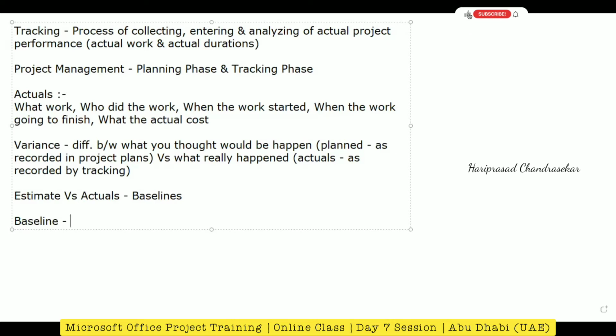A baseline is a snapshot of your project that you take when you complete the planning phase, or sometimes at the end of some other critical phase. So you can take multiple baselines. You can take the initial baseline after the planning, and then take another baseline after some critical task happens. In my field we call it baseline and revised baseline. A snapshot of your project immediately after planning.